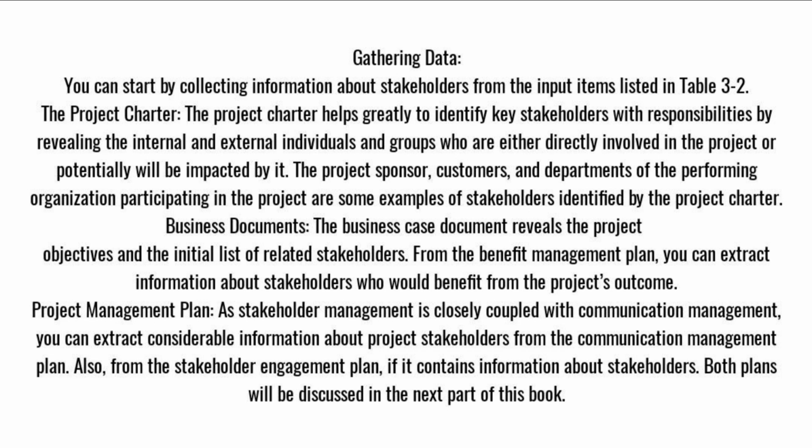The project charter. The project charter helps greatly to identify key stakeholders with responsibilities by revealing the internal and external individuals and groups who are either directly involved in the project or potentially will be impacted by it. The project sponsor, customers, and departments of the performing organization participating in the project are some examples of stakeholders identified by the project charter. Business documents. The business case document reveals the project.